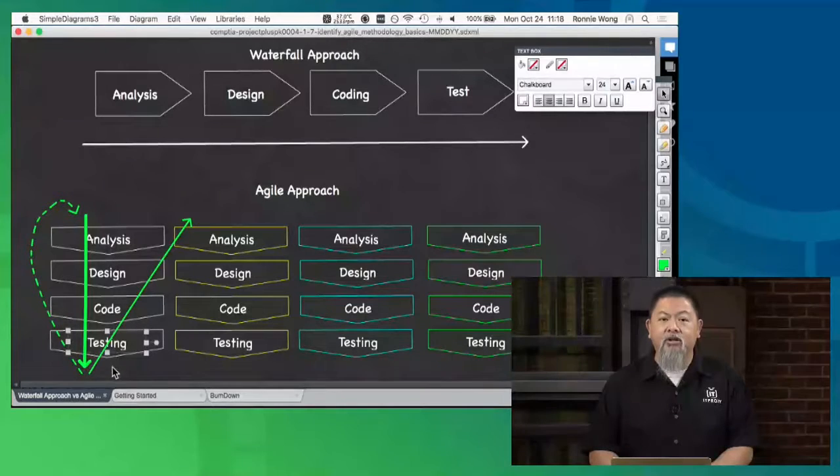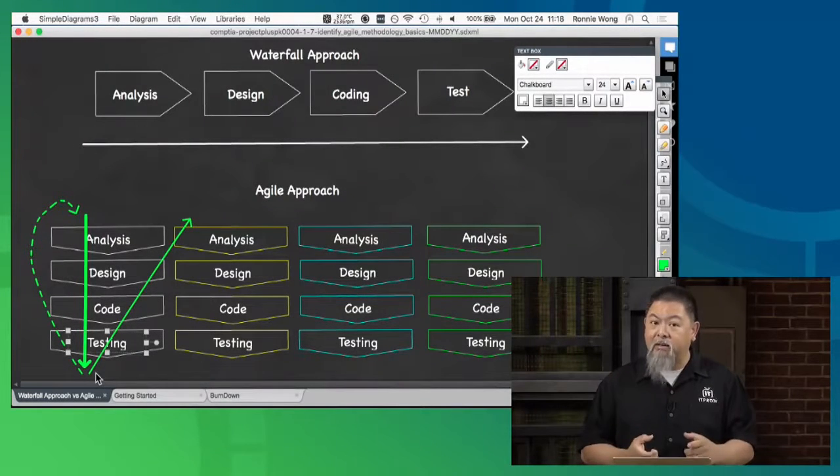De facto, most software development teams that tend to work in this manner of Agile, at least from what I could actually find out, it's about a 2-week sprint is what they normally end up working out as. So what can we accomplish in 10 days of workable time that will give us at the end result here, if we take a look at my screen again, that unit that we really want. We want some type of deliverable at the end of each one of these.